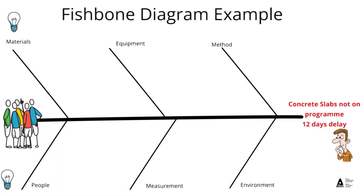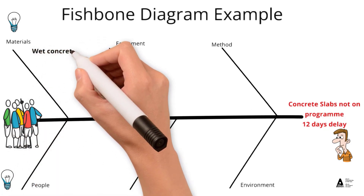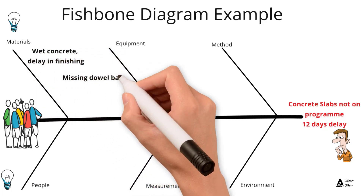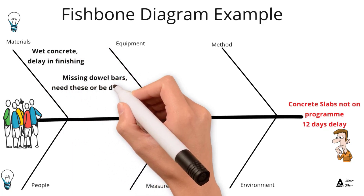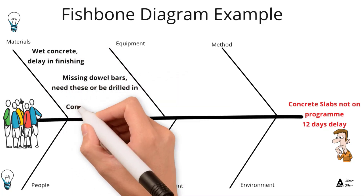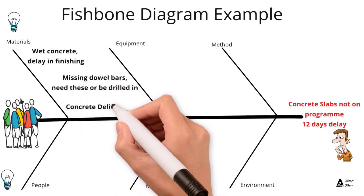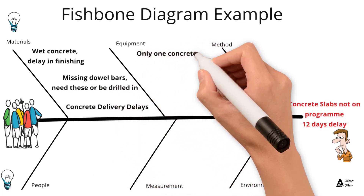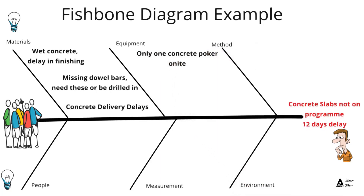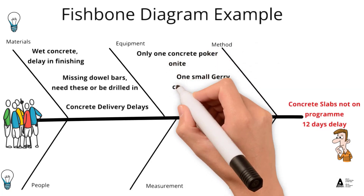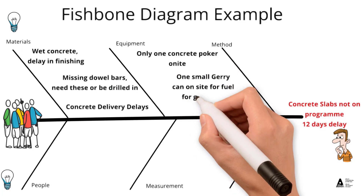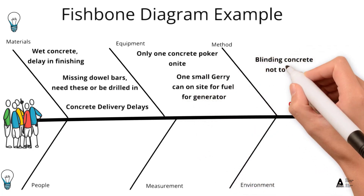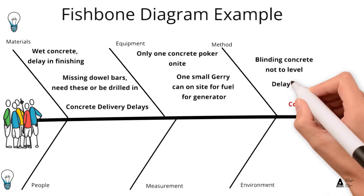Under materials, ideas coming up include: wet concrete delay in finishing, missing dowel bars, and delays in concrete being delivered. These ideas come from anyone on the floor — any idea that comes up is put on the fishbone diagram. Under equipment: only one pump on site, and a small jerry can to refill the generator. Under methods: blinding concrete not to level, causing issues for the steel cage further down the line.